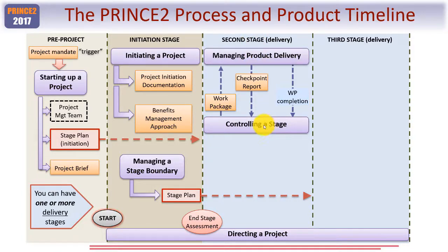Now, the project manager is controlling a stage, this one as it happens, and as part of the project manager's remit, when the project board authorised the next stage, is that the project manager should give a regular progress report to the project board. And in PRINCE2, this is called a highlight report. These tend to be monthly. Again, it could be a different time frame. And this keeps the project board informed.